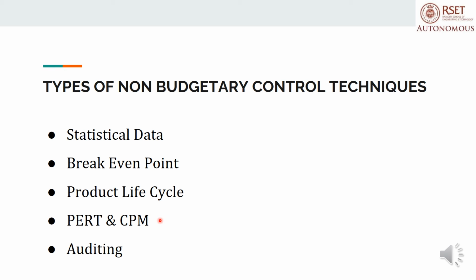Critical Path Method, or CPM, is a technique which is used for projects where the time needed for completion of a project is already known. It is used for determining the approximate time within which a project can be completed. Critical path is the longest path in project management, which always provides the minimum time taken for completion of the project.